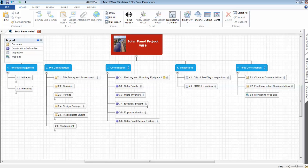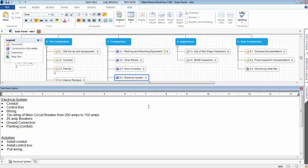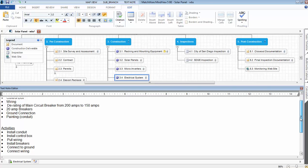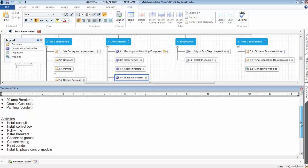The electrical system had a number of different components. The conduit, control box, wiring. We had to derate the main circuit breakers from 220 down to 150. Some new circuit breakers were installed. Had to connect to the ground. And then we painted the conduit or Stellar Solar painted. These are some of the activities.